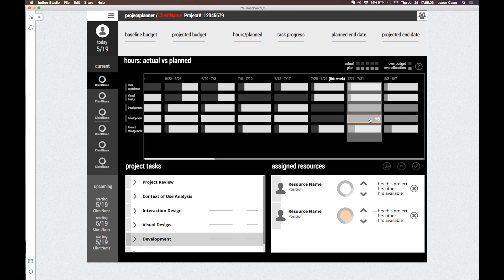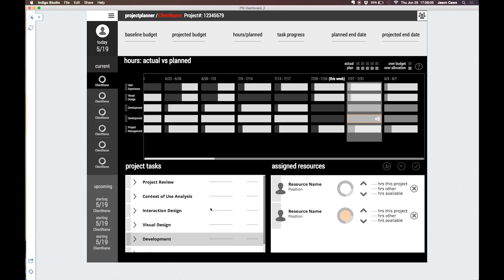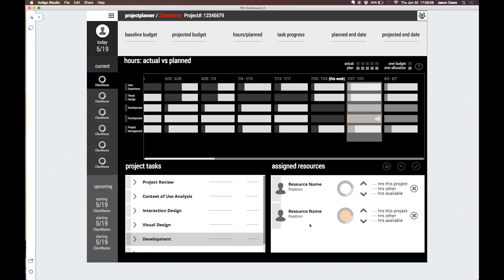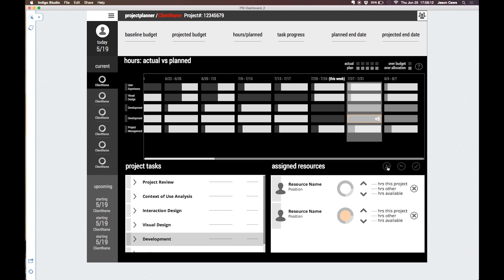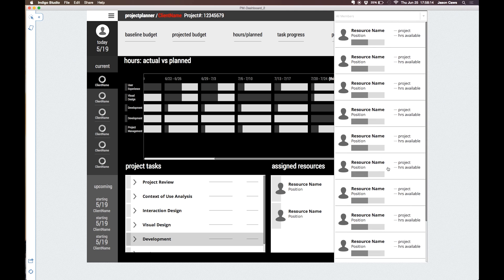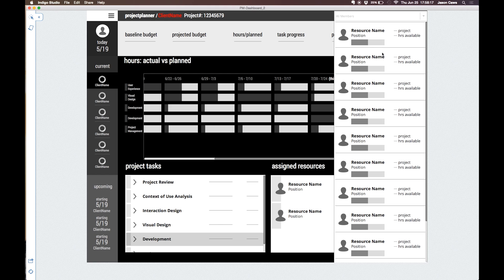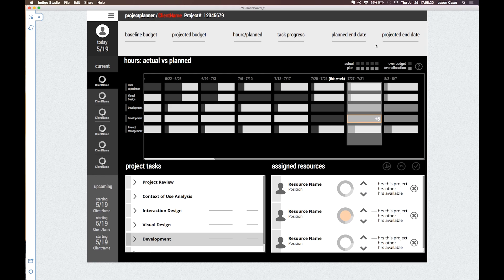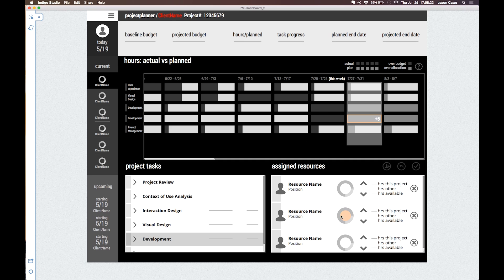We can reallocate hours by selecting a week which also selects the corresponding task and assigned resources. Clicking the add resource icon opens a list of available resources from the right. After selecting a new resource we can use the arrows to adjust the distribution of hours.